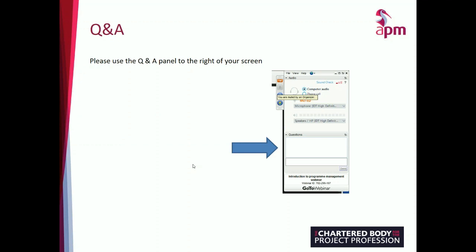Okay, thank you. We've had two people asking how you would calculate disbenefits in the prioritization example you gave. Oh yes, fantastic. Very, very good question. So this is a question of it depends. If I have a disbenefit in my map, which is on a chain which is linking to my main objective, then I would include it in the calculation, because if you remember the prioritization process, all the branches had to add up to 100% at any point.